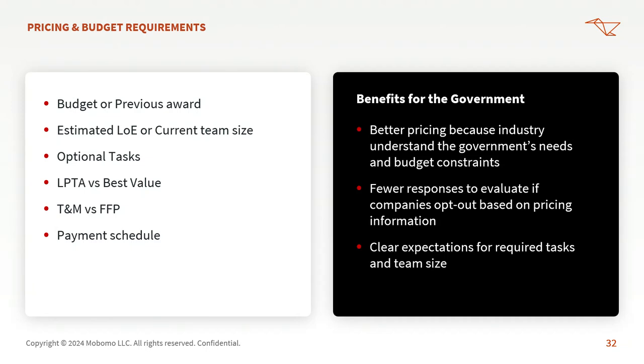The other aspect of milestone payments that's challenging is having someone available for review. What if we get a feature completed right before the person on the government side goes on vacation, and there's another delay, and what is the criteria for getting a milestone approved for payment? It sounds good in theory, but I think milestone payments create a lot more work and overhead, the approval process and the invoicing side. So don't be afraid to let the industry do a standard payment schedule, same amount every month, if it's time and materials or whatever.